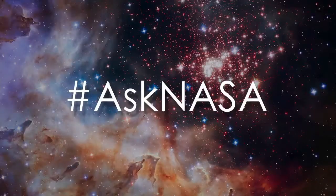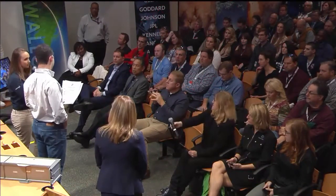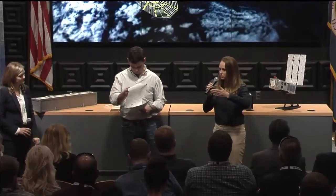So yeah, this question came in through hashtag #AskNASA, and it's for Orbital, and it's the question from at Skyfire747. Is there a specific order of loading supplies onto the rocket? Very good question. Yes, there is. So certainly things that are closer to the door are more accessible to the astronauts. And so NASA gives us a priority for what is installed and based on what they are going to take out. So certainly the crew will start in the front and then they go towards the back. So that is given to us by NASA, with install this in a certain order, and we follow that accordingly. There's also what's considered late load cargo, so things that are time critical. Those are installed later in our flow.